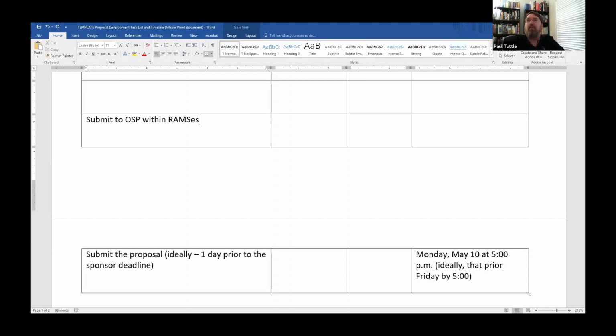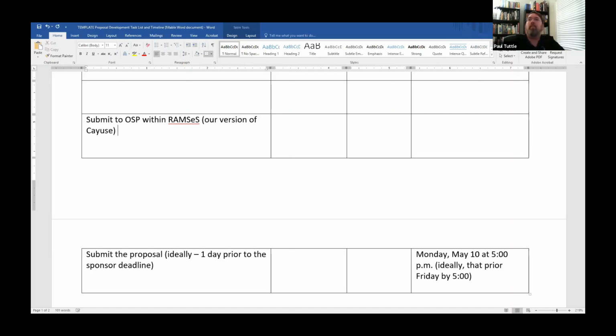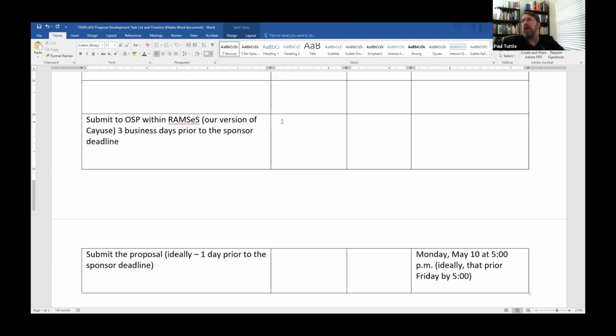Again, that's our version of Cayuse. 3 business days prior to the sponsor deadline, so that prior Wednesday, that would be May 5th.